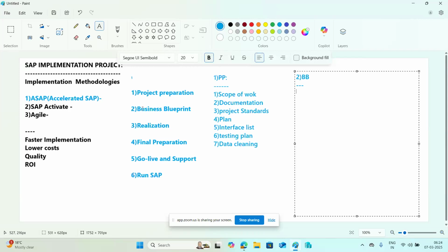It will start the kickoff meeting with the customer. This is the phase. The kickoff meeting is the kickstart of the project, and it gives an overview of the project plan and future activities. Mainly the IT team, meaning your account manager, project managers and consultants, attend. On the client side, the higher management, project managers, process managers and the core team members of the project attend. Why? Because it's the kickstart meeting, the first meeting with the customer in this phase. Before that, you are just preparing the activities, plan and design within your team.